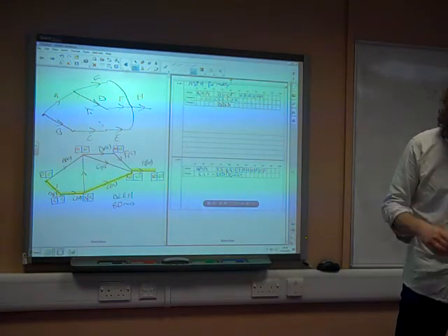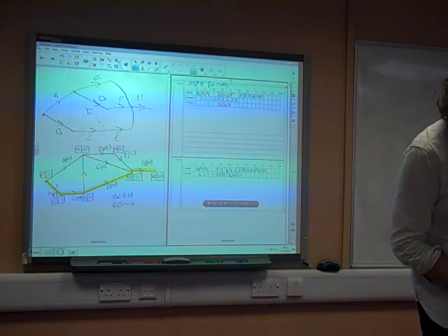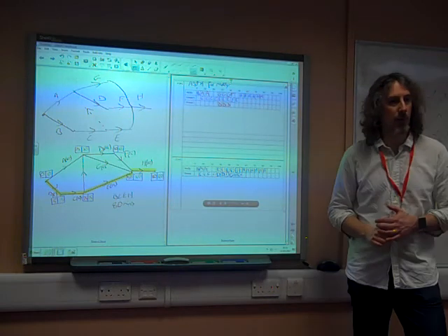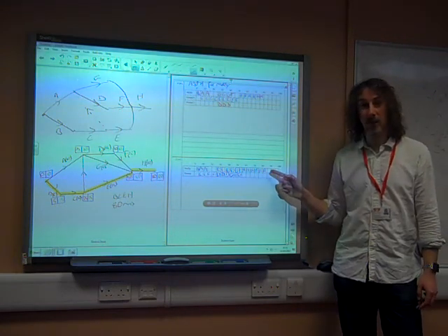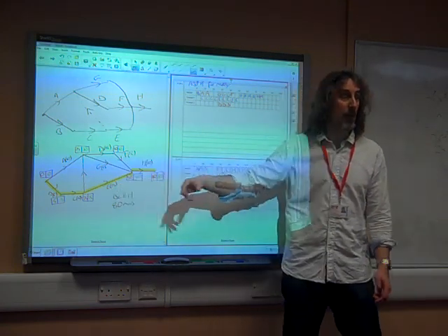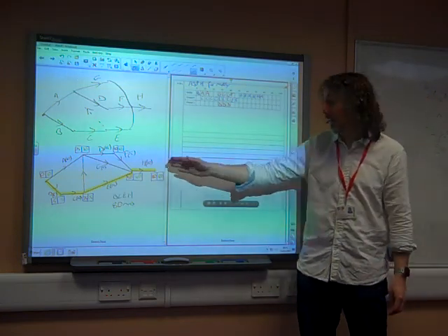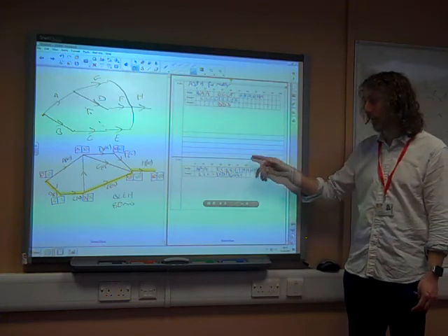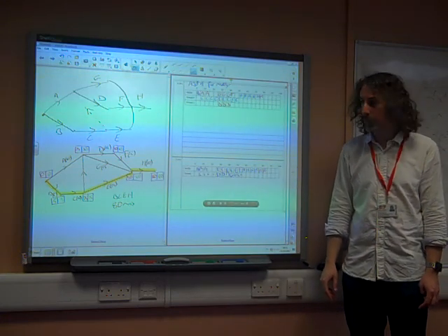And you see how you think that through. I think that is a unique solution at this point. I don't think there's any other way of doing it other than that. Do you see how I started by putting H in at the end? Because H relies on everything else being completed. If the whole project is going to be 5 minutes longer, then H had to start 5 minutes later. So that's quite good, because that kind of ties up how the end of it is going to finish. I think that's a crucial thing to do.